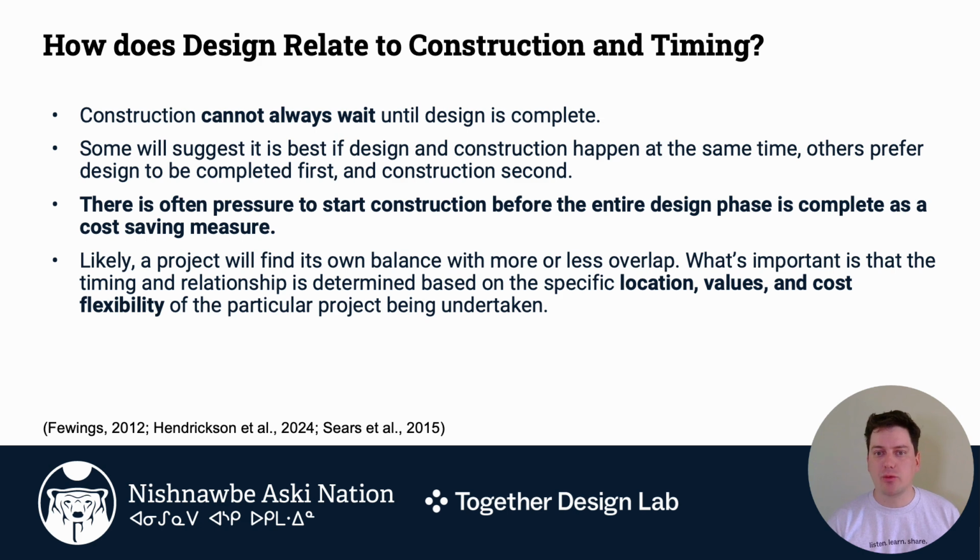It's about finding the right balance for you and your project and the risk that you can tolerate, and understanding that not every decision, and we'll certainly talk about this more as we talk about scheduling throughout the course, not every decision can happen one after the other with things being totally complete. Instead, often decisions in housing, and design is one of these examples, might be incomplete when the next activity has to start to be able to ensure that you remain on time.